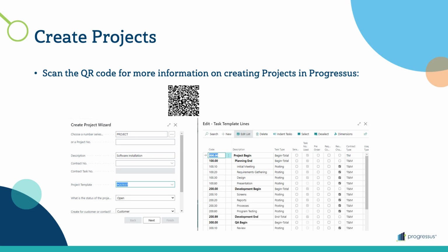If you use the Create Project Wizard, you can optionally have the task structure created for you at the end of the process. The task layer enables you to divide the project into smaller tasks, and therefore use more specific details in budgeting and quotes. In addition, it gives insight into how a project is progressing. For example, you can track whether you're meeting designated milestones or you're on target to meet budget expectations.